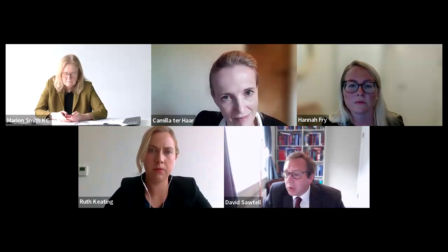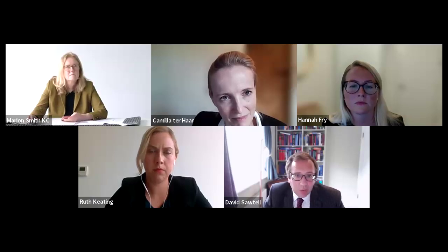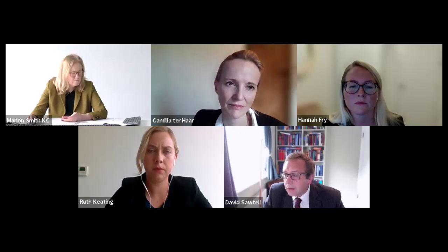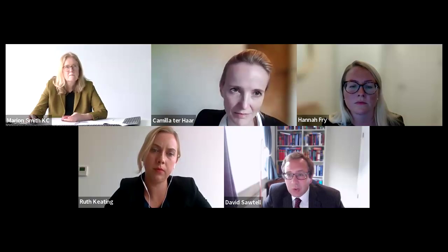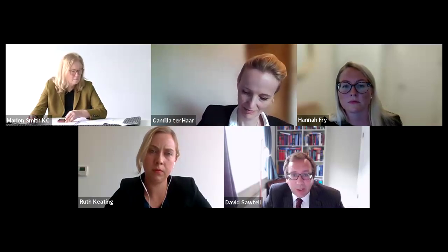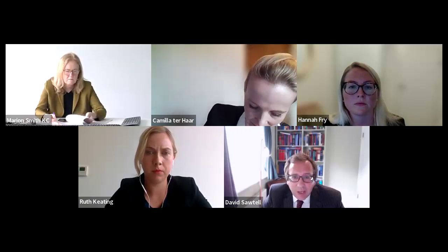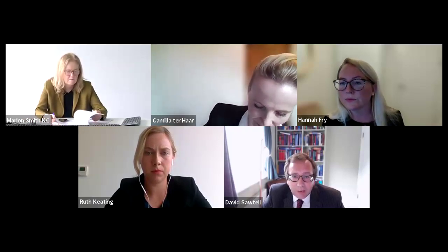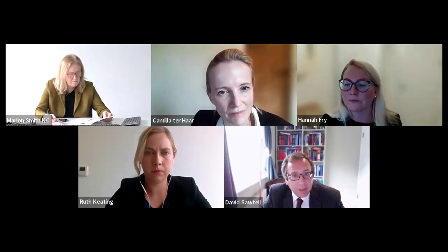Of course, that change is likely under Part 3 of the Higher-Risk Buildings Procedures Regulations to be a major change, which means that you're going to have to make an application to the Building Safety Regulator to make that change under Part 3, and you're obliged to make an application, and they can take a long time to consult and think about it. What the JCT doesn't say is who is responsible then for the extra time, the extra money in respect of that application.